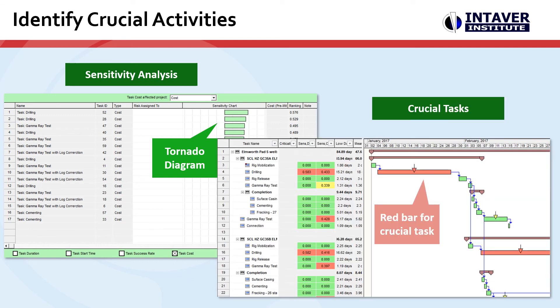The crucial task view takes that same analysis and plots it on the Gantt chart, making it easy to identify activities in the schedule where we should focus optimization efforts.